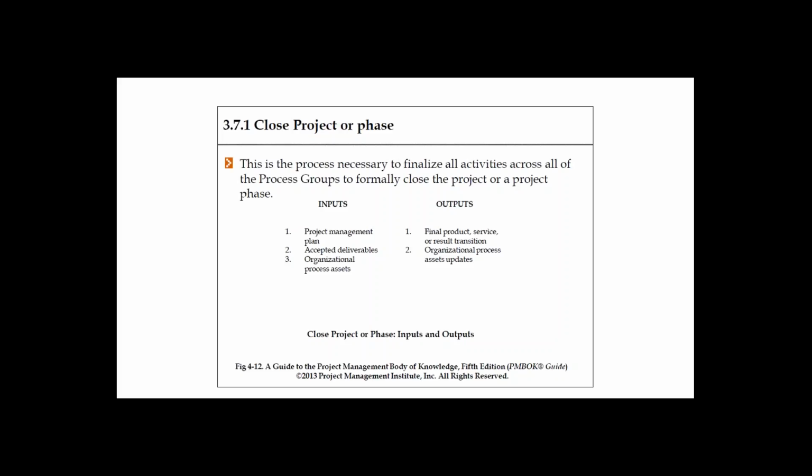It might say no, that it's not, since the end product has been delivered, and it is already up and running in production, and it is giving awesome results. One option is that this is a successful project completion. The other option is that the project is not complete because the closure is not complete. The second is the correct answer, because you did not officially complete the project. Got it. Okay, Gopi, I'm clear now.